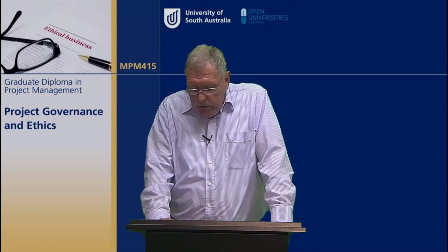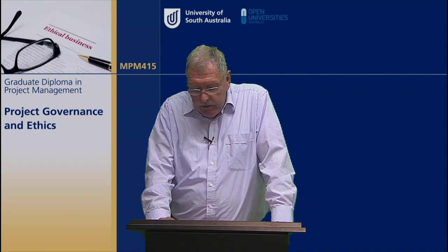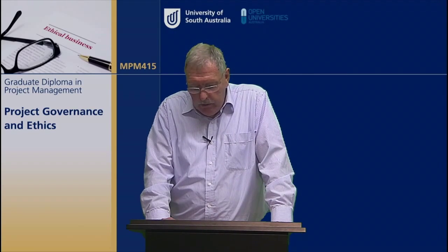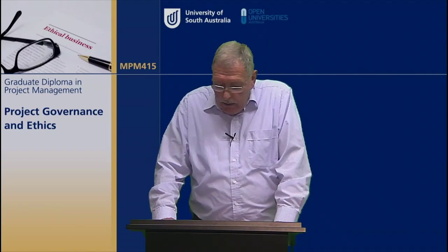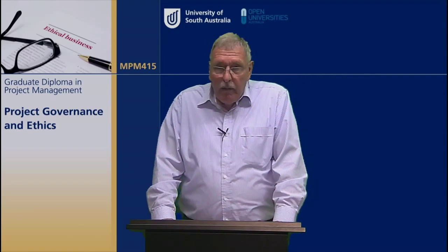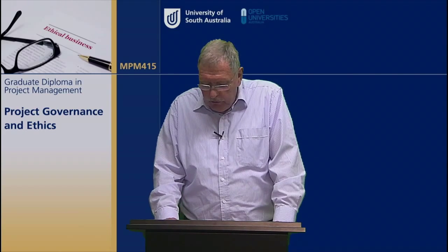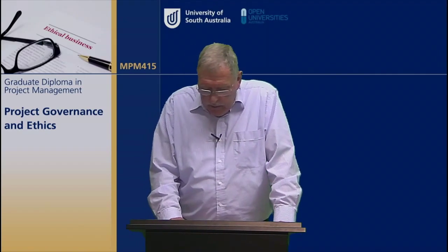The Victorian Treasury in Australia lists the lack of project governance and stakeholder management as the 2nd and 3rd most common cause of project failure." End of quote. Therefore, a strong governance framework is essential for all projects, regardless of the size of the project or the industry sector in which you are working.